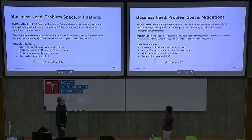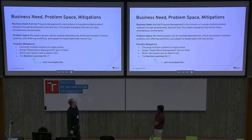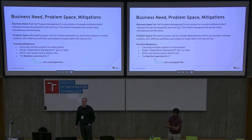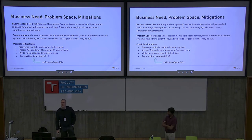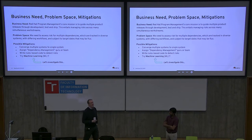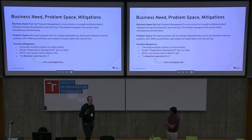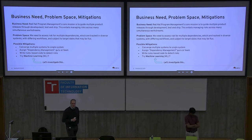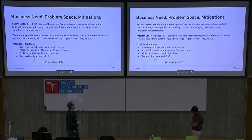I'm with the program management team at Red Hat, and our primary mission is to guide multiple product releases through development and tests and through ship. This means there are a lot of dependencies across a lot of diverse systems. Frequently those systems work differently and they don't talk to each other. The problem we have is how to anticipate and manage risk for heterogeneous systems. That's complicated by the fact that most of the target dates in play are constantly in flux, so we have to do ongoing risk analysis against a set of changing target dates.